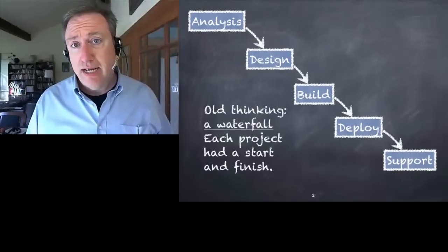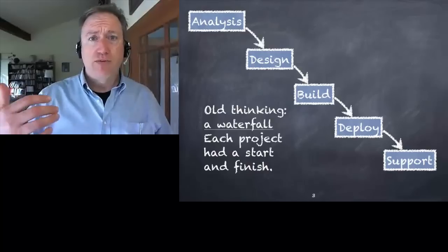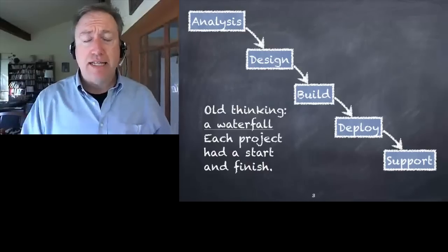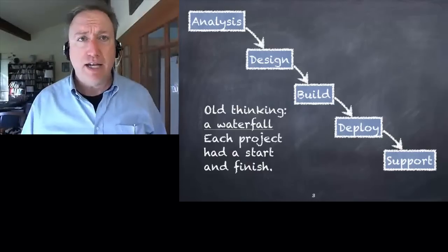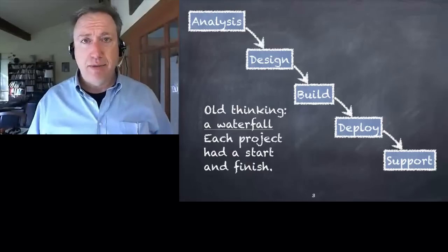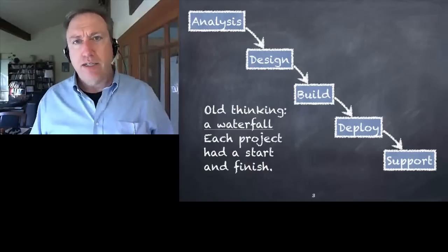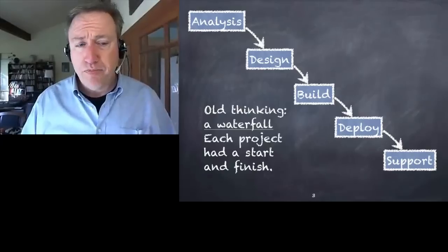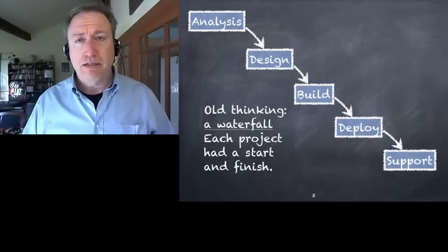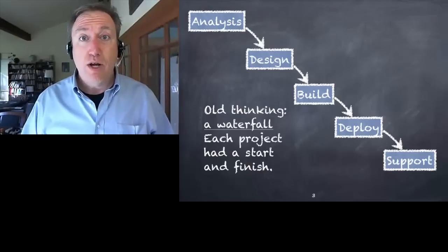Now, we used to think that these happened one after the other, kind of like a waterfall, where you would sit down and analyze everything that needed to be analyzed, and you'd throw the resulting set of documents over the wall to some sort of design team, and then they would figure out the best solution, and then they'd throw it over the wall to some other coding team, and so on. Down the pipe it would go. Big systems take a year and a half, 2 years, 3 years to develop. And by the time you're done, what you've built doesn't look anything like what anyone wanted.